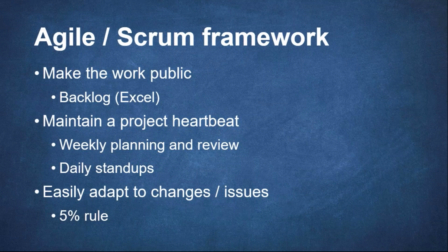But we maintain a heartbeat by planning what we're going to do, doing it, and then reviewing it at the end of the week. We have a daily stand-up meeting or email, depending on what the customer prefers. The key with those daily stand-ups is to identify any impediments that might be holding us back from completing our goals that week. Again, this allows us to easily adapt and change with issues and new requirements that come up.